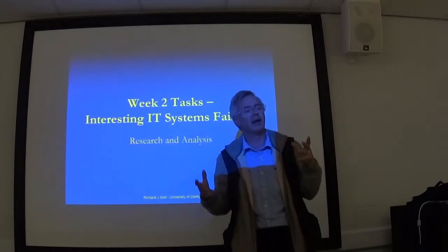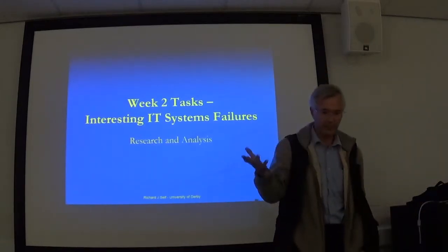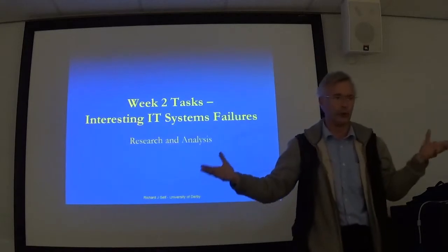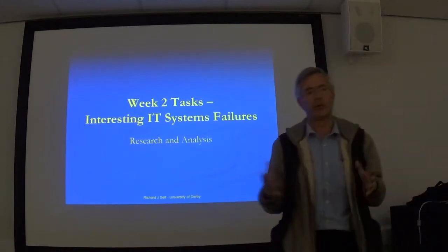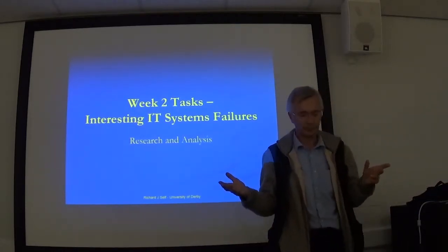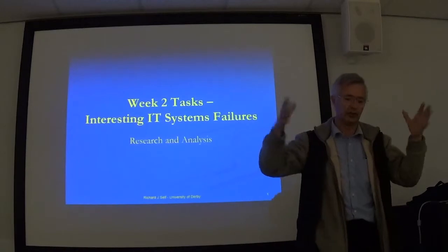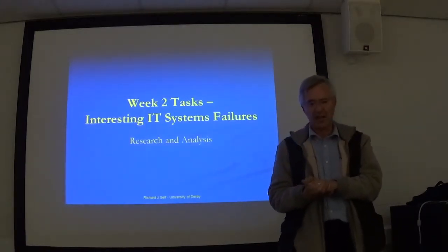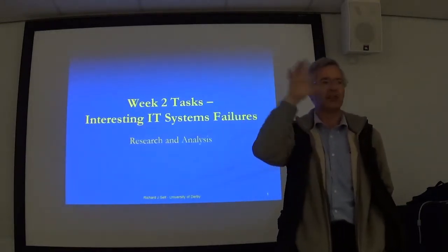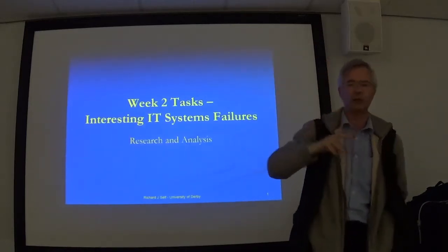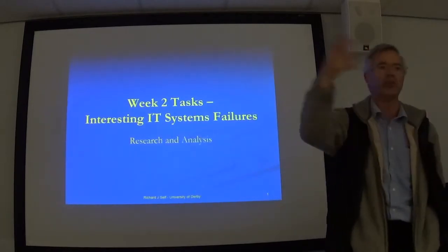I had other real-life experiences in industry. We were implementing SAP to replace about 400 legacy systems, some 20-40 years old, some 1-2 years old. Going through the Pareto process, we cut down to what we were going to do with SAP. About 6-8 months later, someone came forward saying they needed to run a particular set of reports and analyses out of the system in order to satisfy some external contracts with partners and suppliers.